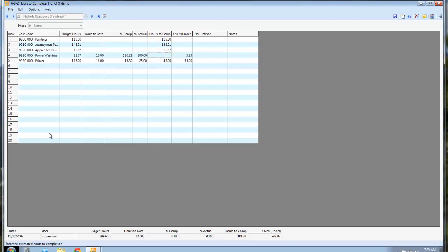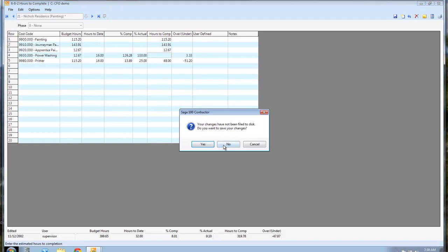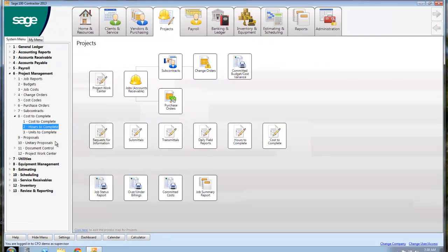It's really nice because you can look at how you're doing from job to job. If you get a job that's similar to this coming down the road, you can go back and see how you did on your budget versus the man hours. And if you need to put more man hours in, or if you can take man hours out and lower your bid, that gives you a better chance to get the job.